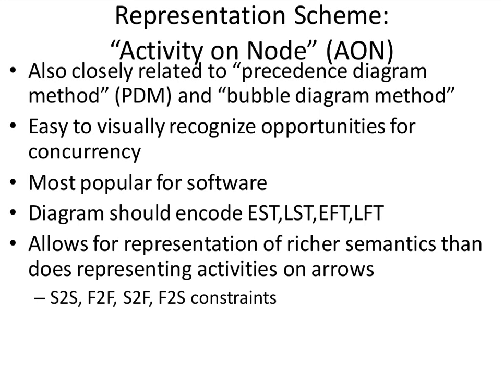We won't be talking about the nuances of this. I used to, but no longer. The type that we'll be assuming here is what's called a finish to start activity. What I mean by that is that the preceding activity has to finish before the next activity can start.